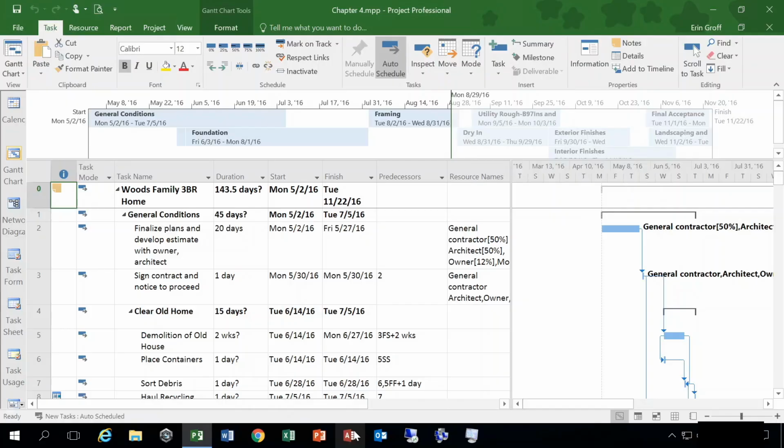A cost resource is a resource used to capture expenses or track a budget. A budget resource is a special type of cost resource used to keep track of cost versus budget through the project lifecycle. Standard cost resources are assigned to tasks to keep track of expenses associated with the task, such as a travel expense, purchase of a license, and so on. Budget resources can only be assigned to the project summary task and are used to track the budget at the project level.